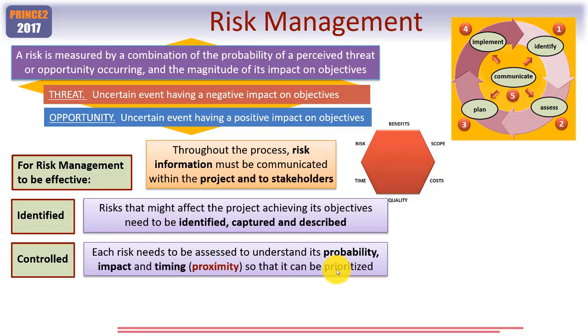so probably you ought to do that first. Then the other flavour of activity that you'll learn about in time management is importance, and this normally talks about a high impact. So coming back to risks, can you see here that proximity has some bearing on that? If a risk were to occur, and it would occur very close to this moment, then you want to focus your actions on that particular risk. Whereas you may have a risk whose impact is much higher, and therefore may need to be prioritised higher. However, if that risk was unlikely to happen in this management stage, but highly likely in the next management stage, again, you'd carry out the urgent actions first.